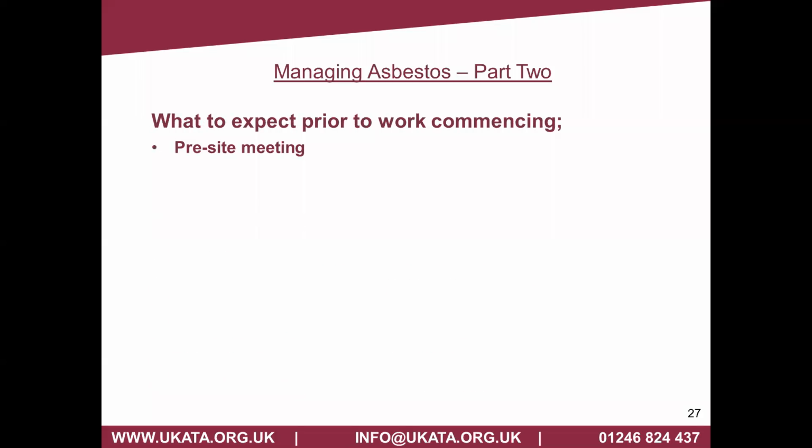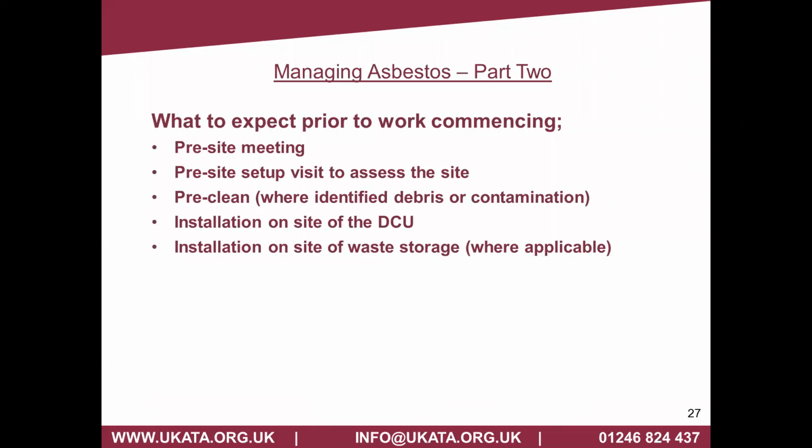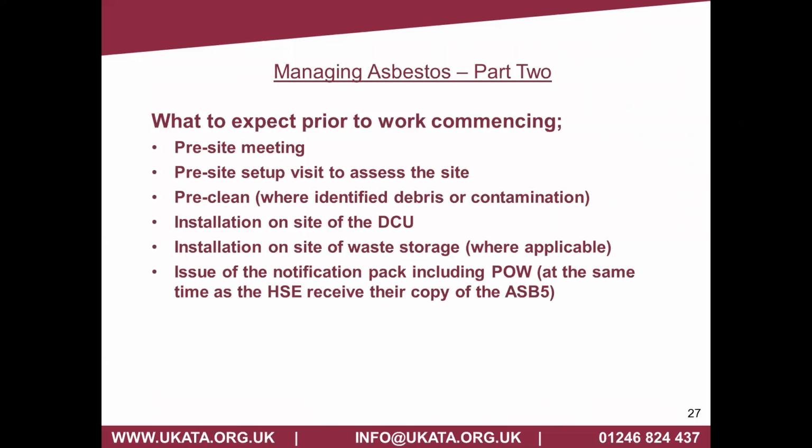What can you expect prior to commencing the work? Well, they will have to come to have a look at the work. They can't assess that remotely. They'll have to look at the site setup to see where they're going to locate certain equipment, such as a decontamination unit. They may have to pre-clean if there's already debris on the site. Waste storage, such as skips, so if you can facilitate and allow them certain site storage for their equipment.